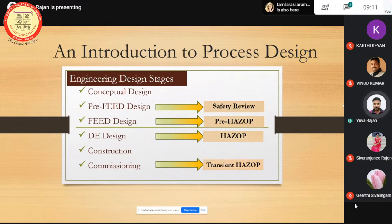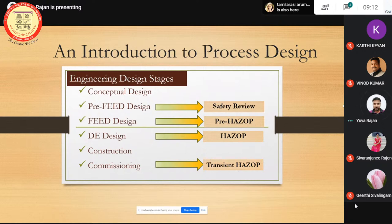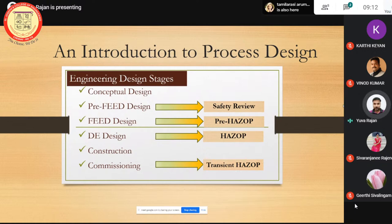After construction is completed, the next stage is commissioning. Before commissioning, they do a walk-down of the entire constructed facility — the operating company, owner engineers, owner representative, and engineering company representatives walk the site together. They prepare a punch list and check whether construction meets expectations. Once approved and signed off for mechanical completion, they go for commissioning. This is also a core area where a chemical engineer can play a role as a commissioning engineer.